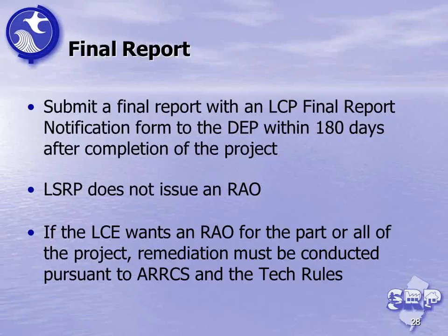An LSRP doesn't need to issue an RAO for that project unless, and here's the exception, and again Tessie touched on this, unless the LCE decides for either business reasons or for scheduling reasons or for contractual reasons to remediate a particular parcel or portion of the parcel, and therefore they assume the role of a responsible party and want to get an RAO for that particular area.